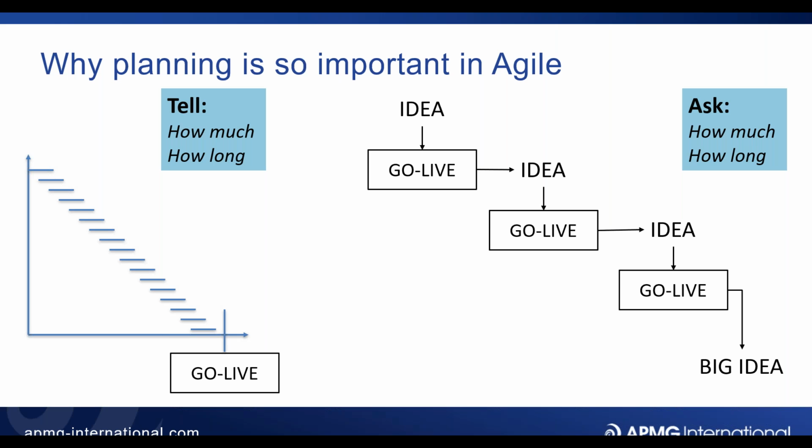And that's one of the things I think we need to think about with Agile: we are going to create that level of detail. We do understand what it is we're doing, but we are going to do it piece by piece. And I am not going to lay out a detailed plan over the next couple of years, because if I do that, there's a very good chance that what I plan now for the late 2020s is going to be nonsensical, because things will have changed in January, February of next year that would affect the work I'd already planned for November, December of that year. So why waste my time?